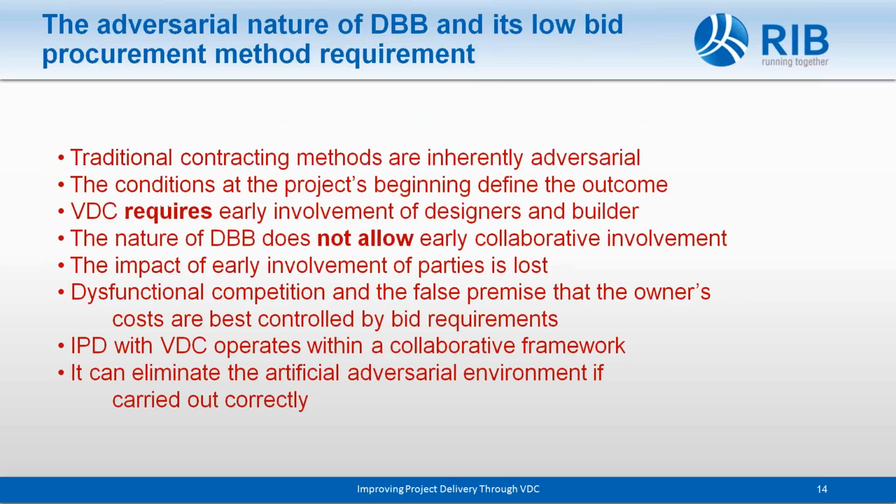A problem with the waste, and the reason projects are late and things like that, is that there is not early collaboration between the designers, the contractors, and the subcontractors. They're not even chosen yet in a design-bid-build method. The design is done by the architects without contractor input or involvement.